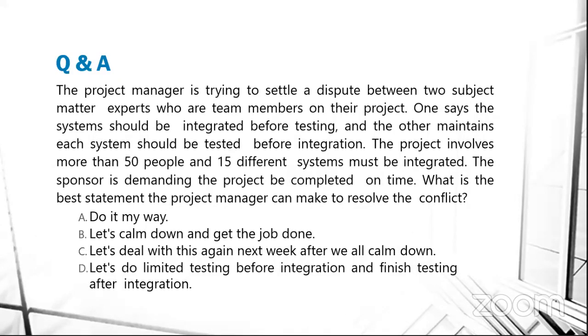In order not to cause a serious conflict, to resolve this conflict now, we're going to use the D approach here. So we say, okay, let's do limited testing before integration. Then when we finish, we can now do the full testing and all that.